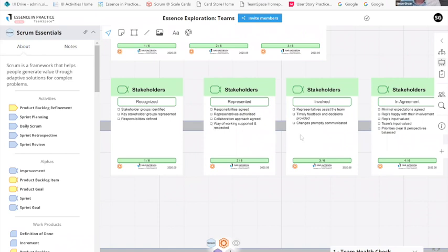If they had done this, even if they just did it every 6 months, just going through these and being honest about yourself and saying, have we identified all our stakeholder groups? Are they all represented? That second point, key stakeholder groups represented, they would have looked at that and realized that was false because the person that represented the board had left and the new person that was on the board was not represented in this project's governance at all. So just this simple game applied throughout an endeavor starts to expose that kind of risk.